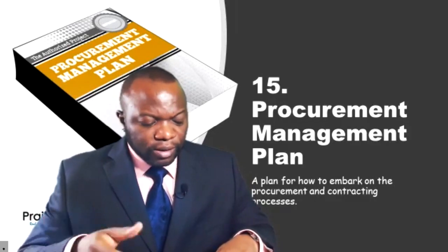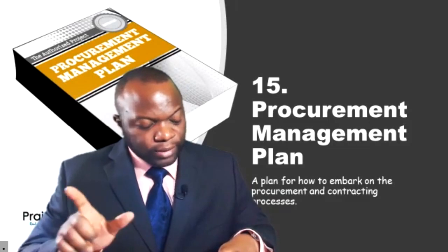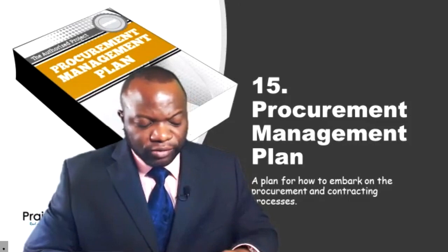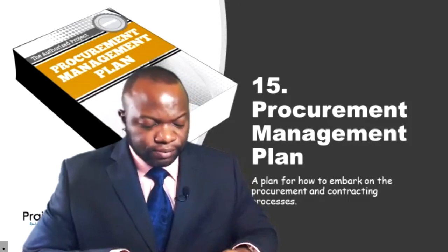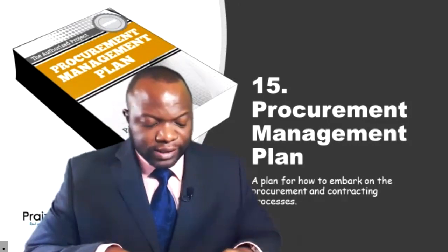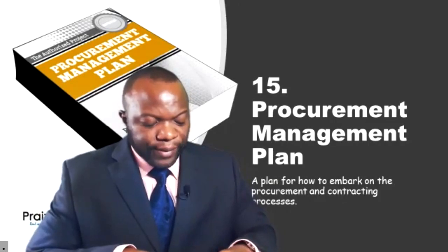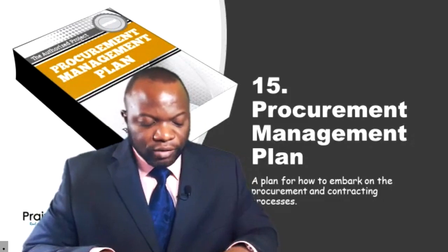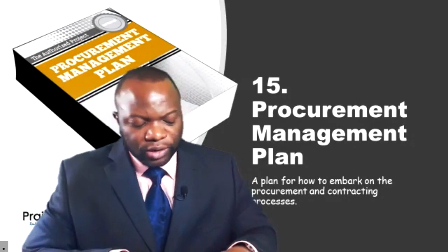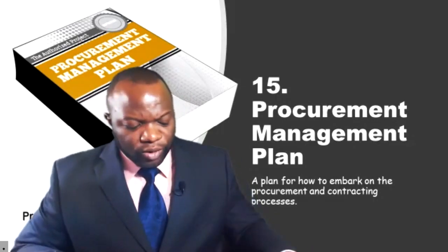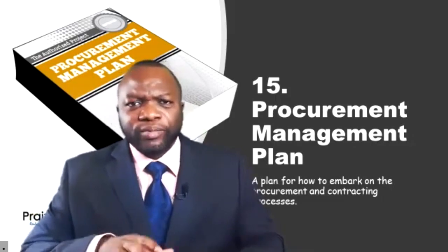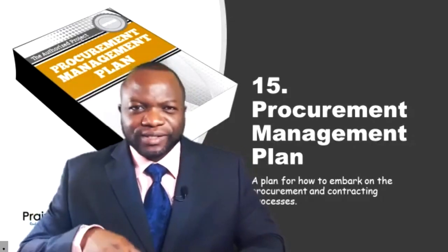procurement, the legal jurisdiction, that's important, and currency in which payments will be made, determination of whether independent estimates will be used, and whether they are needed as evaluation criteria, risk management issues, including identifying requirements for performance bonds or insurance contracts to mitigate some form of project risk, and pre-qualified sellers to be used. But the talk about planning procurement goes beyond this.